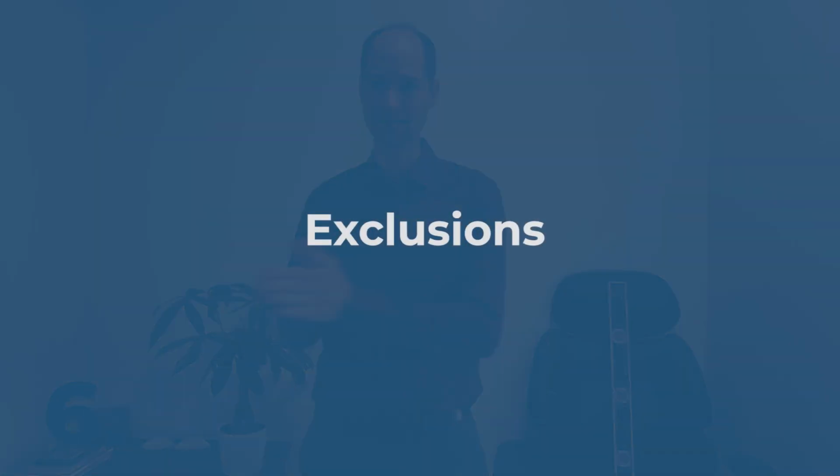So what is included? Labor, materials, warranty, all this kind of stuff, right? So have a list of inclusions. And then one of the most important parts is exclusions. You need the client to be very clear what's included and what's not included in the estimate, so that it's not coming up later when you get into the project and they're saying, well, you didn't write anything about this. I was assuming that it was included. And now you're at odds over who's going to foot the bill for this thing that wasn't discussed or wasn't specified in the estimate.